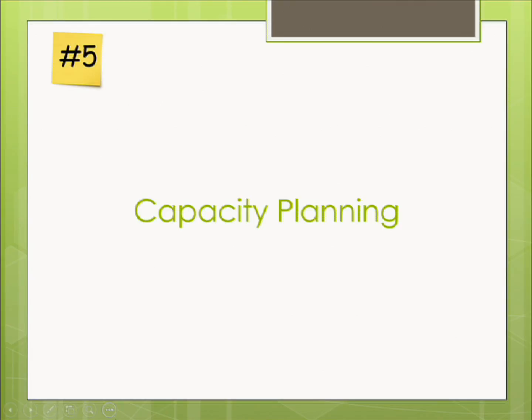We talk about things like, what percentage of your time is everybody going to spend on development, analysis, testing, other stuff? If your team is working on multiple different projects and the work items are broken up by project, then break your estimates out by projects. I'm going to spend 30% on this project and 70% on this project. And you may want to break your team into smaller teams to do this exercise.